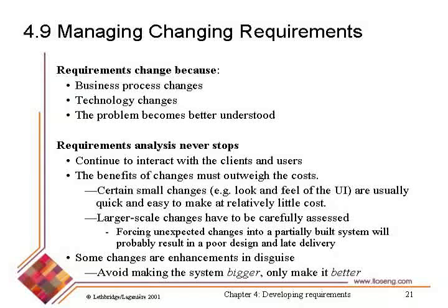If you specify a requirement at the beginning of the process, it's cheap because you haven't developed the system yet. If you specify a requirement change after you've finished your design and half your implementation, it's much more expensive because then you've got to undo some design, change your implementation plan, and so on. And so what might have been a perfectly viable, cost-effective requirement at the beginning might not be a viable, cost-effective requirement towards the end. In which case you might not approve it.